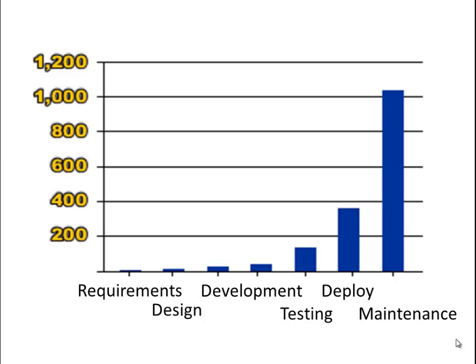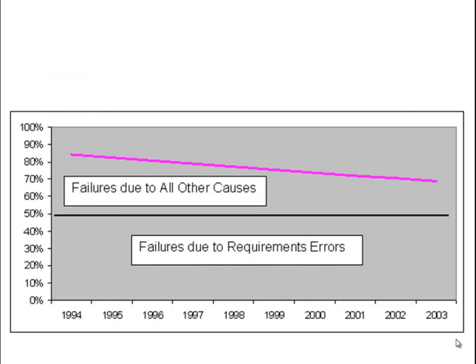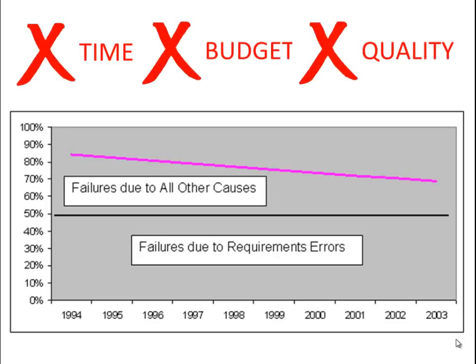But how big an issue is this? How many projects globally are affected by not getting the correct requirements? Studies have shown that about 70% of all software projects fail to be delivered on time, within budget, or to the quality that the customer expected.